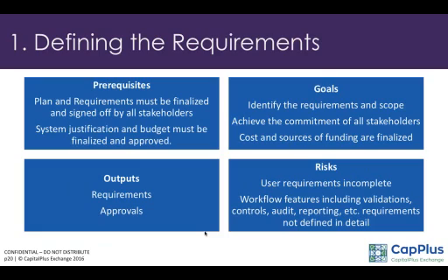Users require flexibility. This is something that I have always seen, saying that if I forget to talk about a report, or if I need a report down the road, how do I get it? So my suggestion is that when you write the RFP, put in a clause saying that during the project period of 12 months or 6 months thereafter, going live, you need to provide 15 additional reports or 25 additional reports that we will define, which the FI will define, which is not defined in the RFP. So you could cover some of those risks by putting in a process like that.